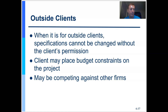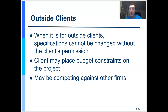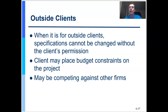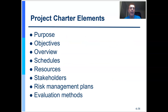You'll also want to develop your stakeholder register. A register is just a list — you create a list of stakeholders, because later we're going to analyze those stakeholders. This includes any outside clients that may be part of it or may change it. For example, if I'm building a nuclear power plant, one of my stakeholders is going to be the government agency overseeing power plants, another will be the organization funding it, and another will be a parents' organization concerned that you're building a power plant near their schools.